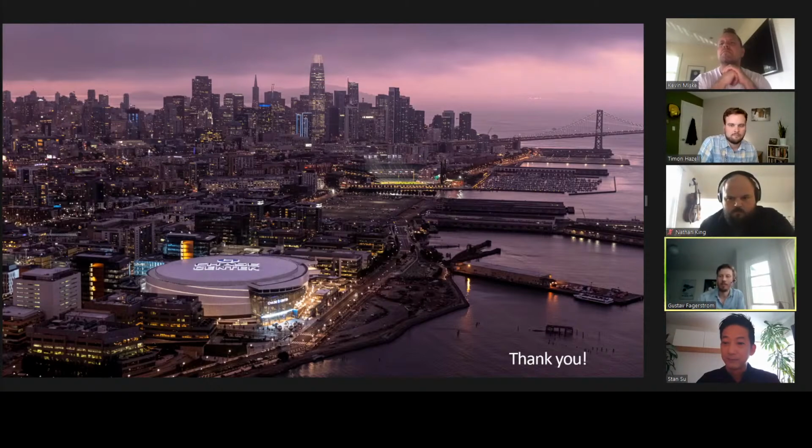We will invariably advocate for that in any case where it's even remotely reasonable. It's still hard, especially in the US market, the way that procurement works, to get that through, because it's perceived as an upfront cost that the client somehow thinks is not going to come back later if you skip it at the start. So it's an uphill battle for sure. But the answer is day one if we can.